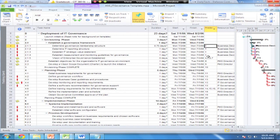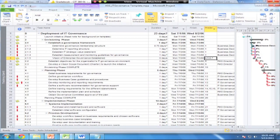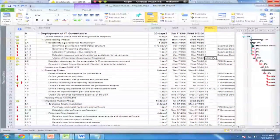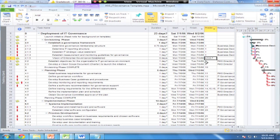Let's build these predecessors in. Each of these four tasks has a predecessor of 1, which is the launch initiative task — that one has to be done before we can start the others. Then down here, 'Vision of Enterprise Governance Established' requires tasks 4, 5, 6, and 7 to be complete before it's done — and that's a milestone event. Then we have tasks 8 and 9 basically lining up linearly, each feeding into the next, as you can see on the Gantt chart.